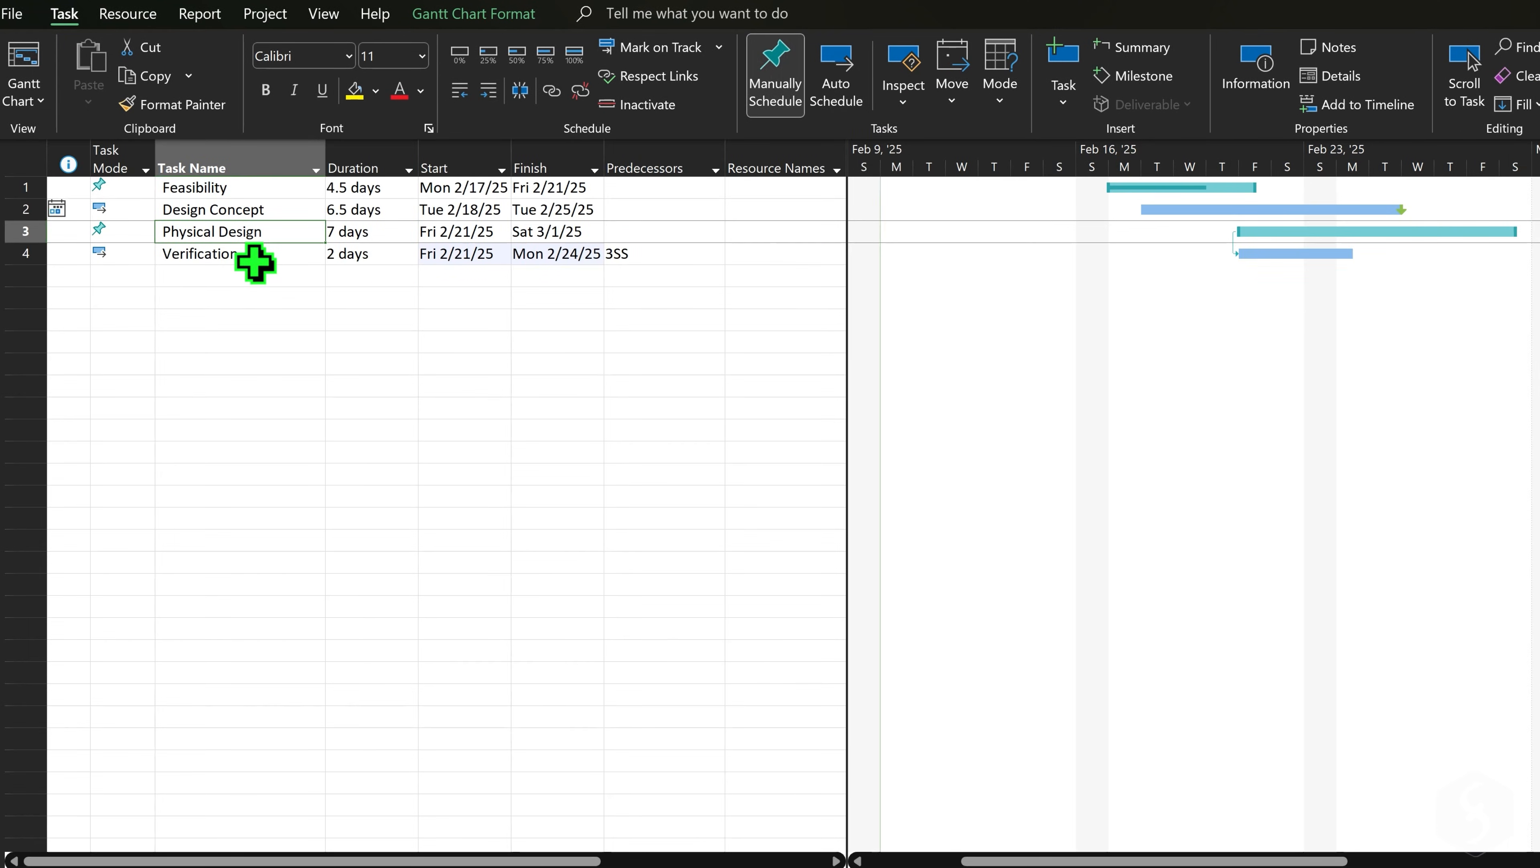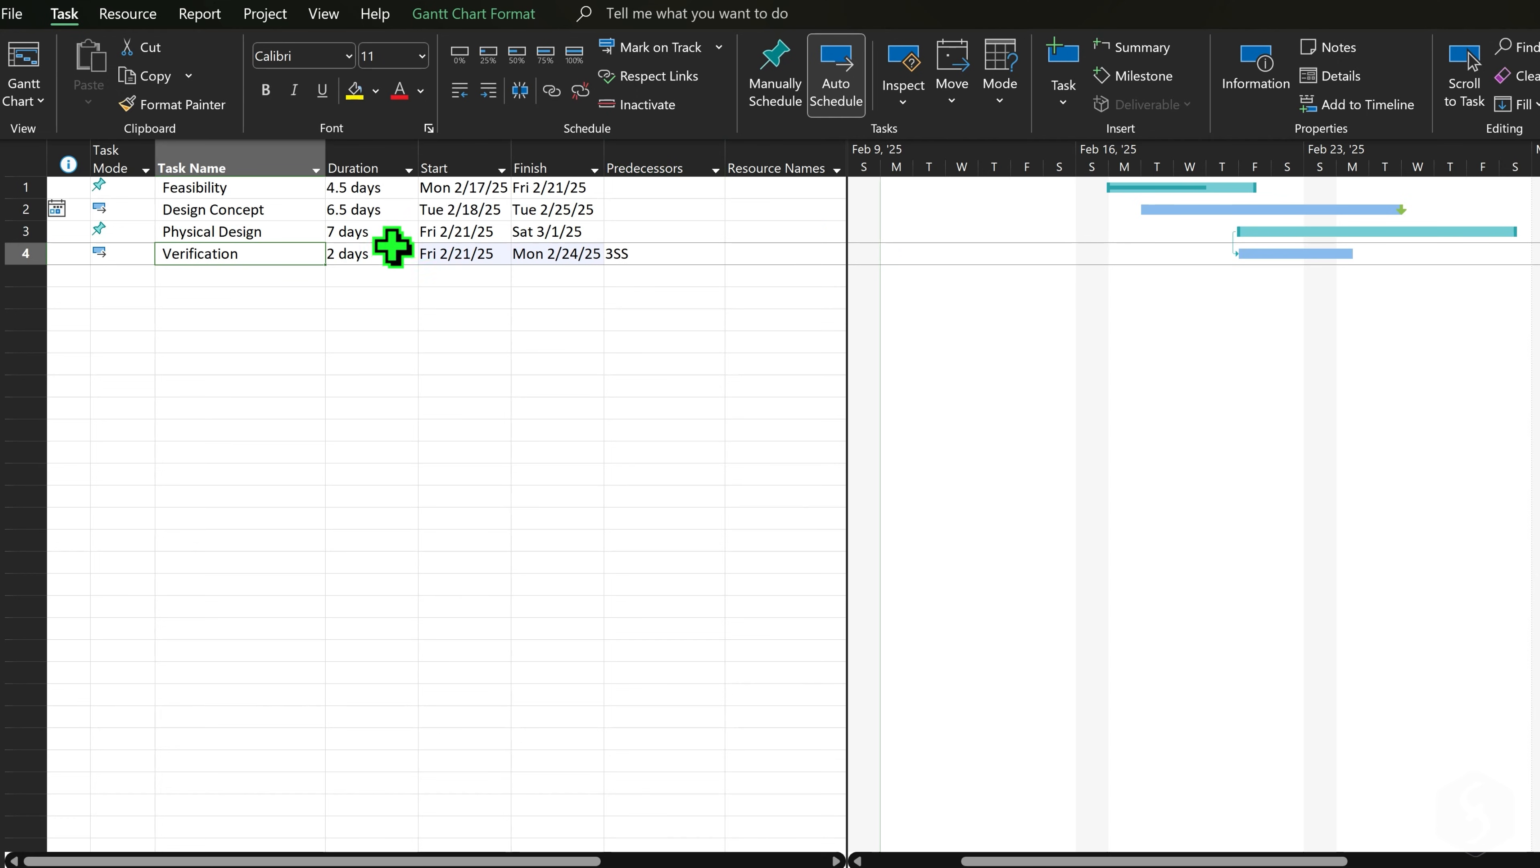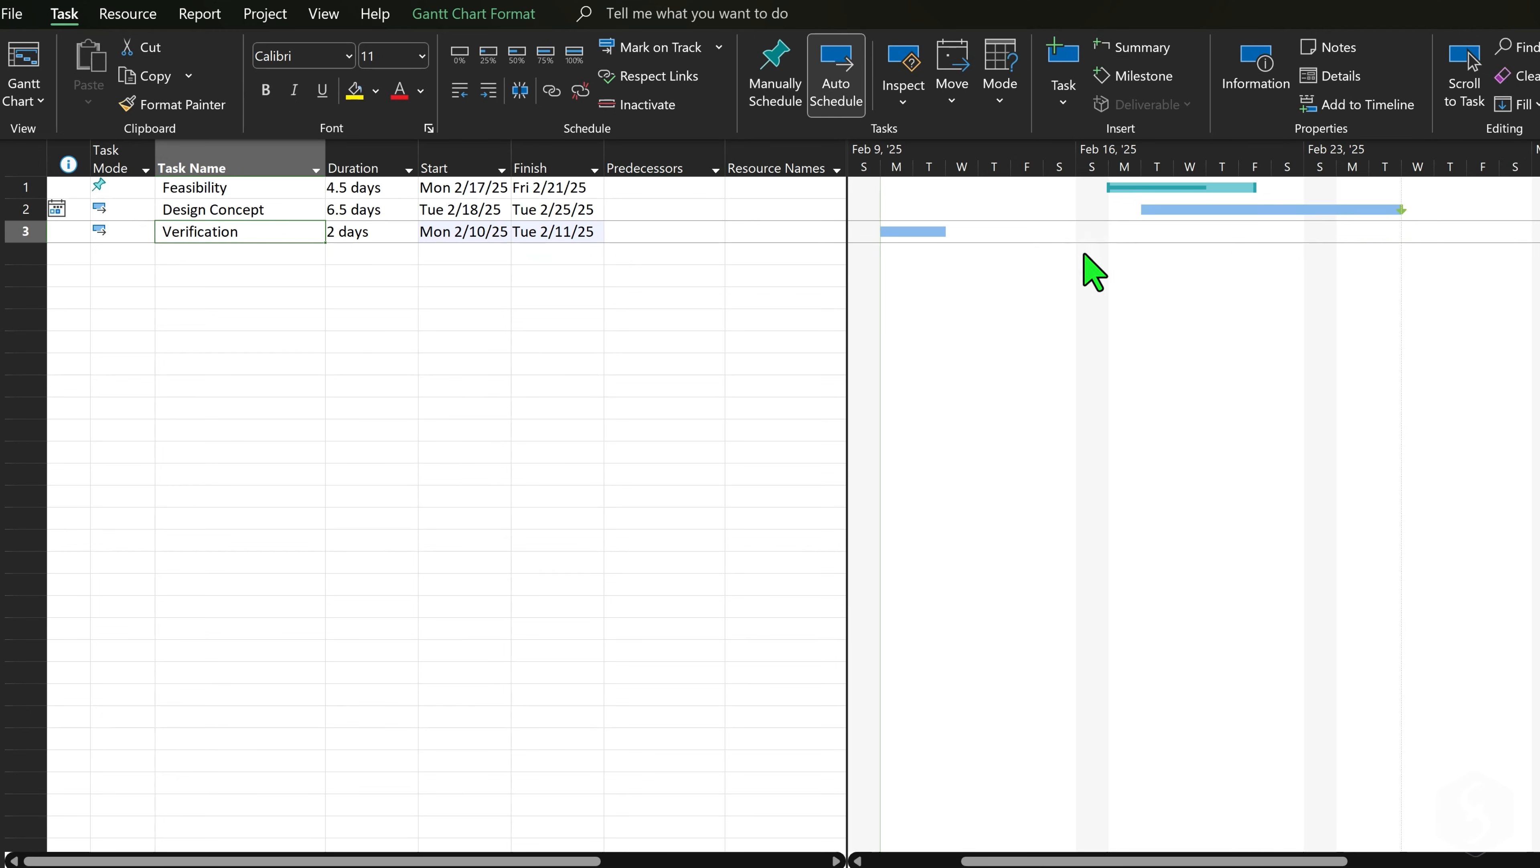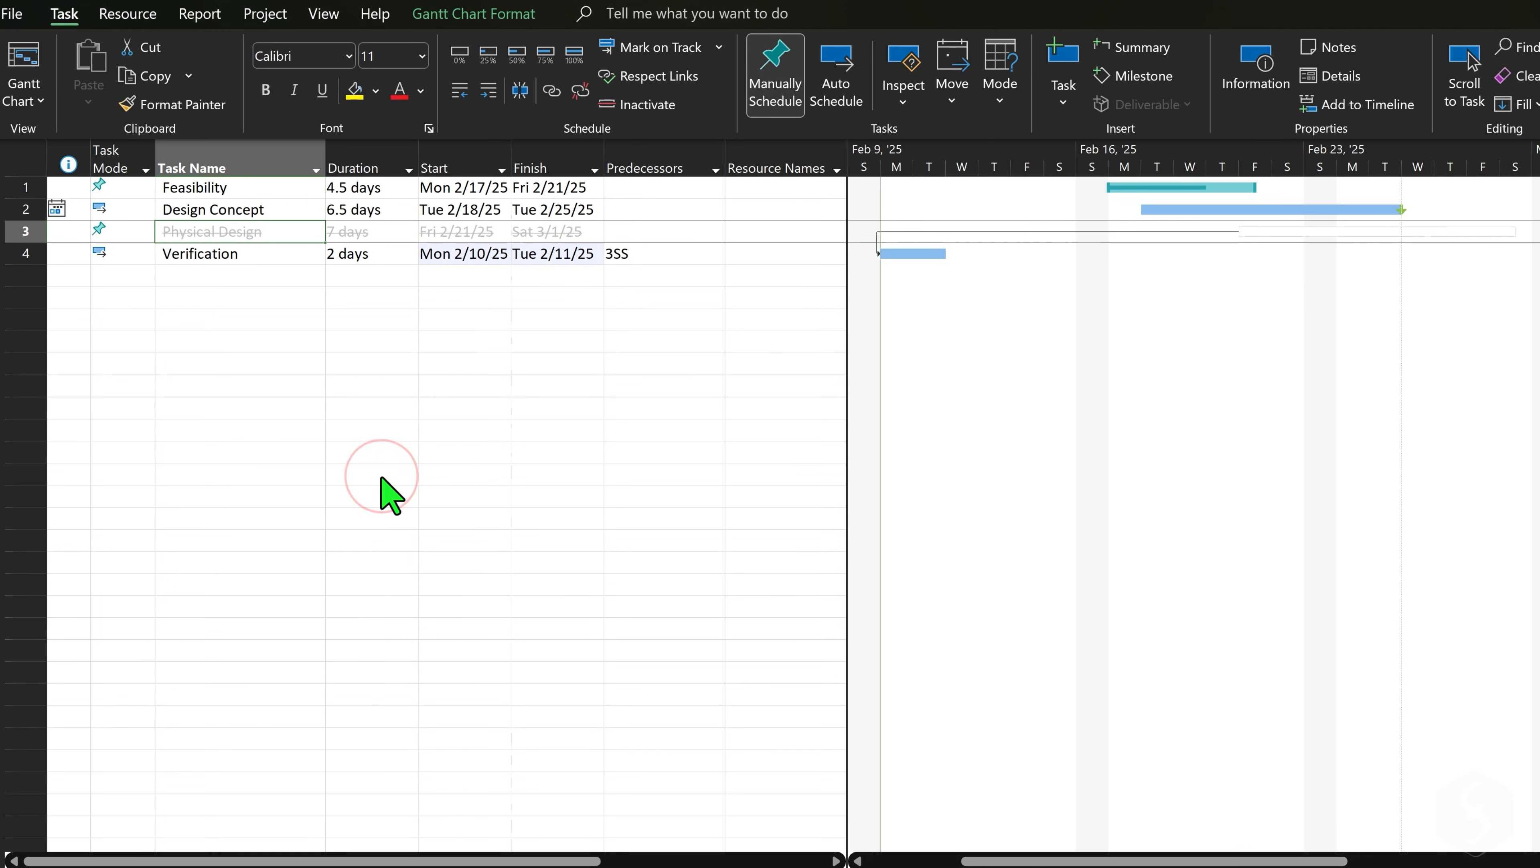To remove links, select any task and go to Task at the top, Unlink Tasks. Links are also removed if you delete any tasks involved. But not in case you inactivate it, although its constraints are no more effective.